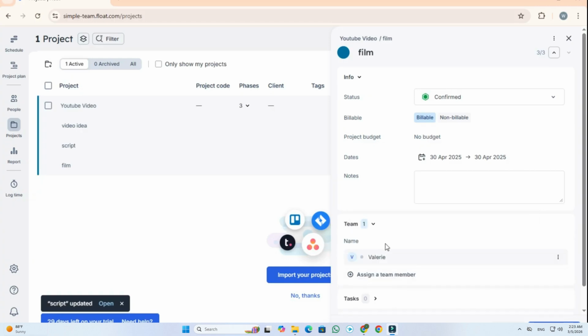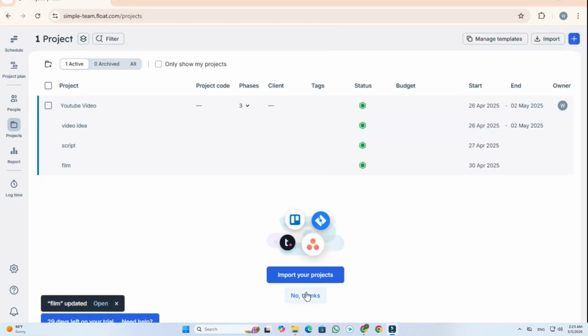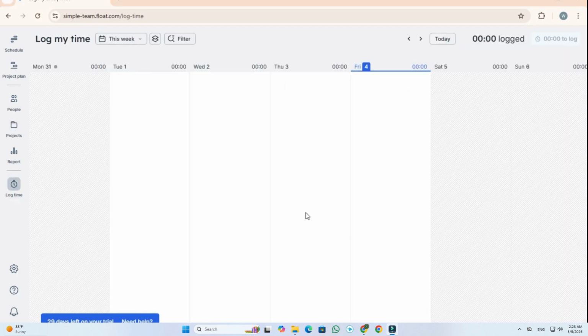Once a team member logs in and accesses their assigned task, they can begin working on it immediately. As the project manager, you'll be able to track the time each person takes to complete their assigned work. Team members can log their hours, and you can monitor their logged time directly from the platform. Additionally, you can view detailed reports showing various statistics, including billable time, non-billable time, time off, and overtime. This feature is particularly beneficial if you're working with freelancers and need to determine appropriate billing amounts.